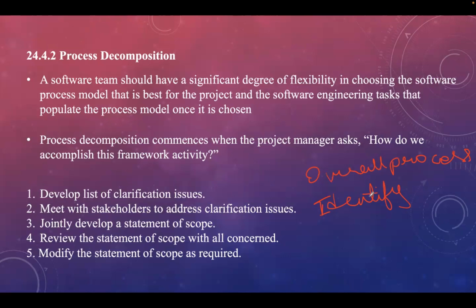And the third step is you need to decompose the activities. So the activities which were identified in the second step, those activities will be decomposed. So break down each major activity into smaller tasks. So for example, if you take coding, so coding can be decomposed into writing code for specific features, then performing unit testing, and then documenting code. In that way, you need to decompose the activity.